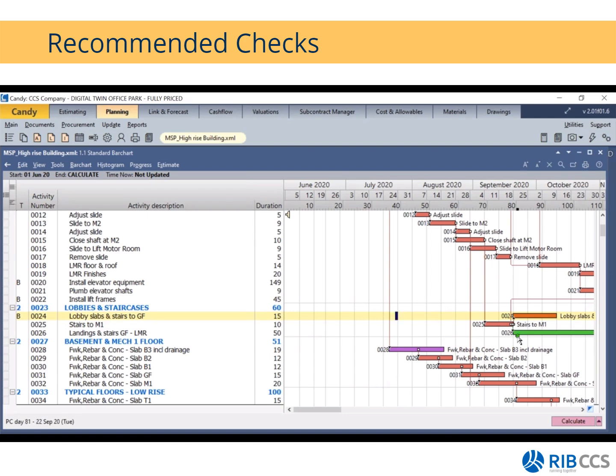We have the green, indicating an activity with float. And then we have a purple color, which simply means that this activity is overrunning its end date. But the minute you hit calculate, it will change back to red until you fully link this activity. So I'm just going to reduce this again to 15 days. On the checklist, we also have the calendar.